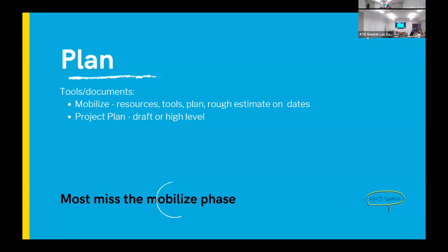And there's various other tools that we can put in there. Mobilize, again, depending on how mature your organization is, you might want to have a communication strategy. You might have a testing strategy. You might have some other strategies in there that are relevant to you. Maybe it's a technology strategy. I mentioned the communication, that's always one of the biggest things, but the mobilize period is essentially the period before you actually start the requirements and design.